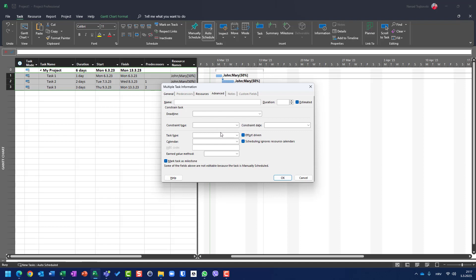And here, two very important things. Here, first of all, calendar. If you want to use your own calendar and you forgot to assign that calendar to your tasks, this is the way in which you can do it. So choose the different calendar and assign it to all tasks.